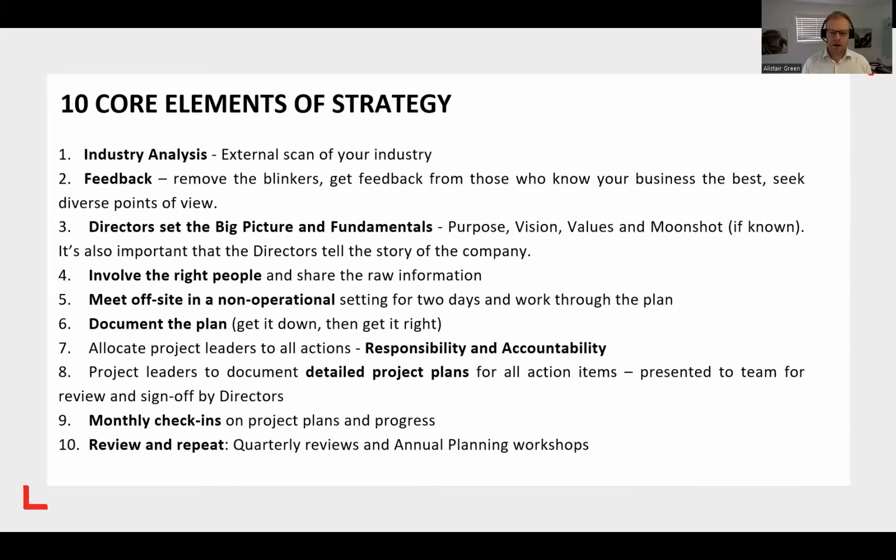Get the project plan out. Hey, let's have a catch up after lunch, and I want you to give me an update on your project. How's the strategic project going? Get them to pull out the plan, update the plan as they're going through, interrogate it and make sure. The things to look out for are if there's no problems and everything is good, that's when alarm bells should be going off for you.